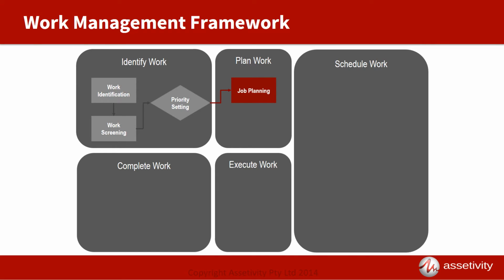Once the job has been planned, the resources need to be procured. Placing the orders is usually the job of the planner, since there are long lead times for many resources and it is not worth passing the job to the scheduler until the delivery times are known. Of course, this step involves working closely with procurement and inventory management staff to ensure that the right parts are available at the right time without incurring unnecessary costs for holding them in the store.